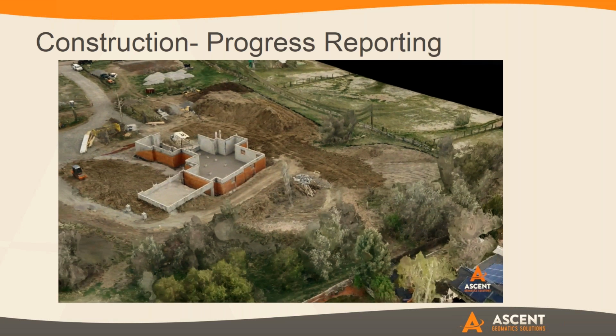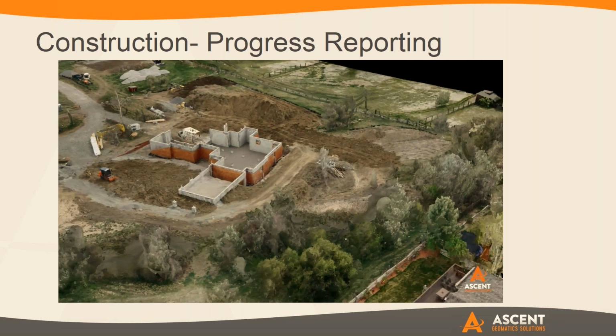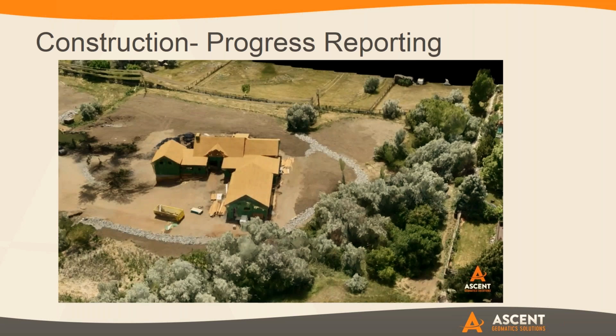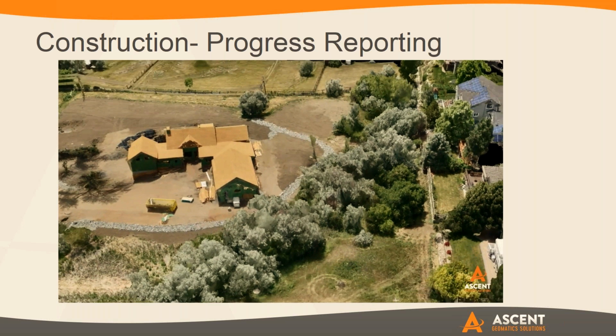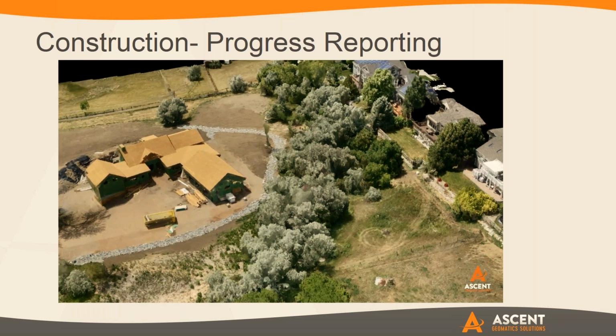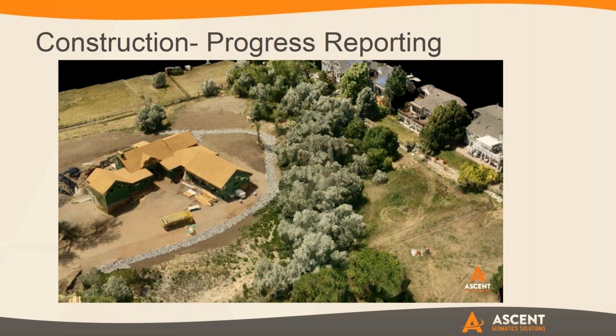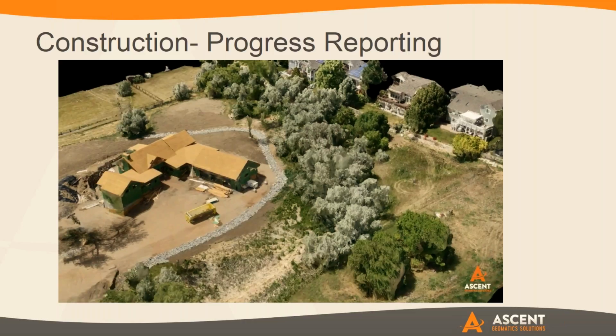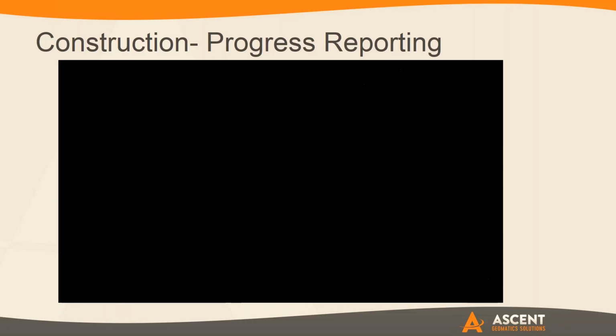How did they develop the drainage? How did they put in the foundation? Did everything actually match per spec? It gets ahead of any potential large impact changes immediately. So if you can do these on a weekly, monthly, or just key milestone basis, you can start to get ahead of issues before they get too far down the line, before you have too much on the ground that is going to be impacted. And just to clarify what we were looking at there, those were point clouds. That was not just a drone flying around gathering aerial video. That was actual data that we were looking at.